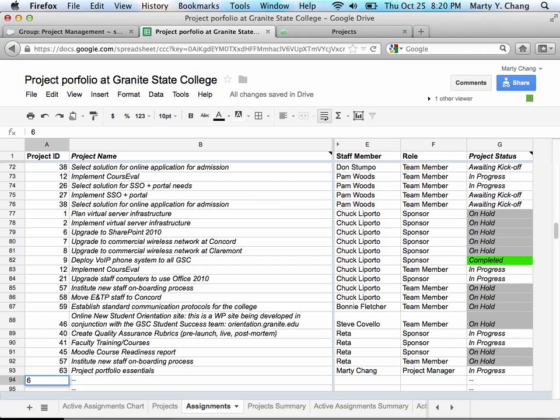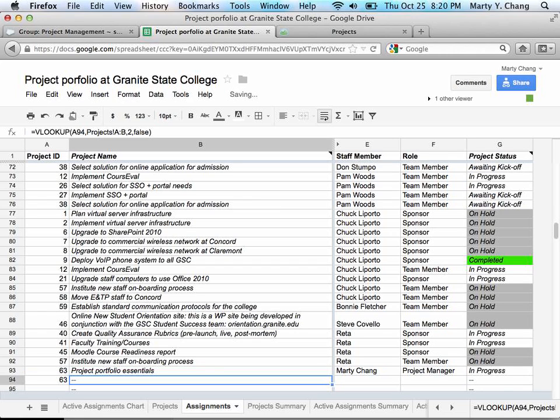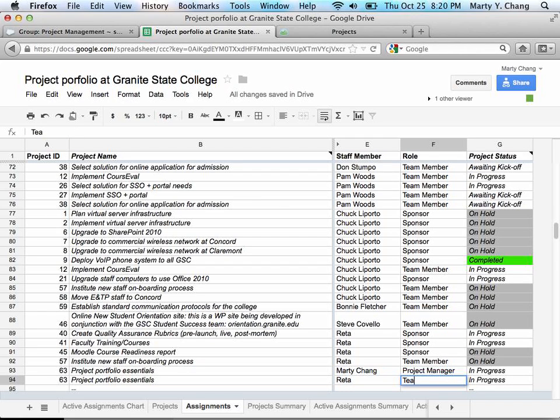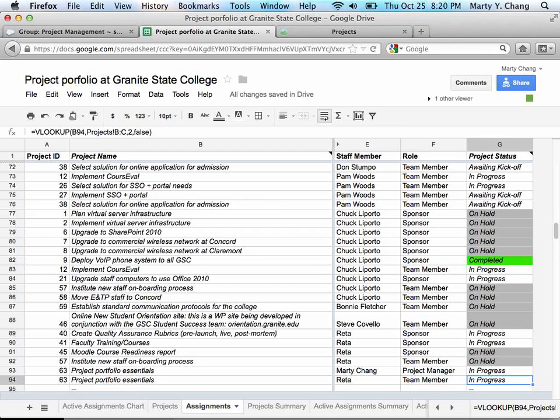So adding another team member to the project is as easy. You just type in the ID, go to the staff member. In this case, I'm going to hypothetically add RETA, and add the role of that new team member. And now you're done.